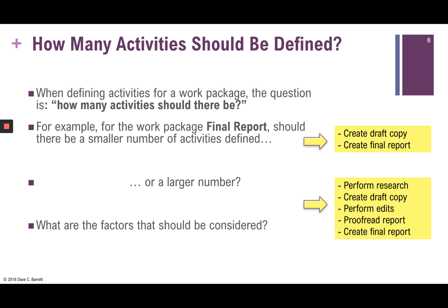When the duration, the amount of time the activity should take, is a moderate amount. You shouldn't have extremely long durations, like an activity taking 30 days. You also shouldn't have an extremely short duration, like something that's going to take 2 minutes to do. That's too short. So there's a moderate duration, usually in the few hours, half day, a day, sort of duration is usually normal.